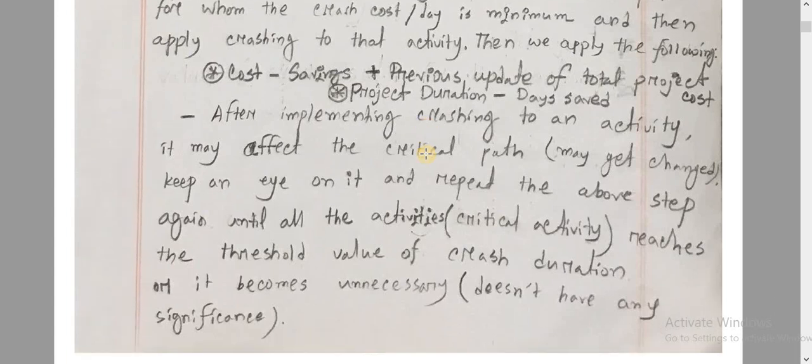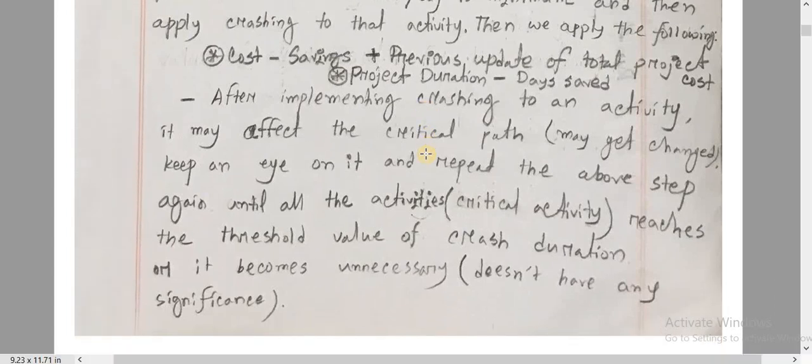The third step: after implementing project crashing on an activity, it may affect the critical path. So the critical path may get changed. We have to keep an eye on it and repeat the above steps.